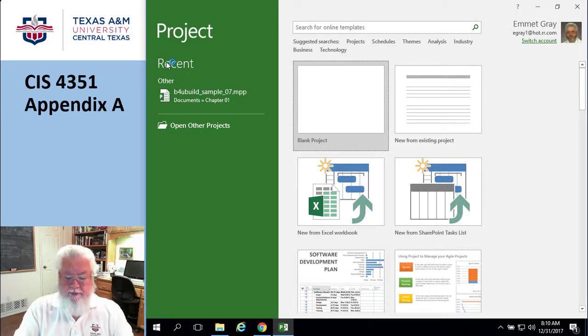Providing other advanced project management features, talking about scheduling dependencies. In other words, you can figure out that this task has to occur before that one, that kind of thing. Critical path, which is kind of the same thing. The critical path is those sets of tasks that are super critical and that a delay in any one of them will extend the timeline. Resource leveling. If you work in teams, you may find a scenario where you have one team that doesn't have enough work and another team that has too much work, and you can resource level.